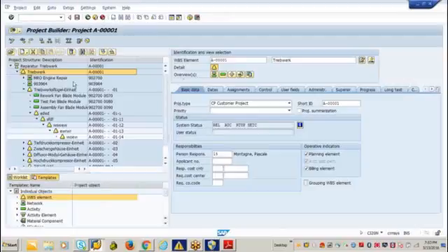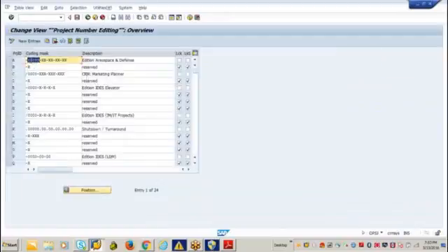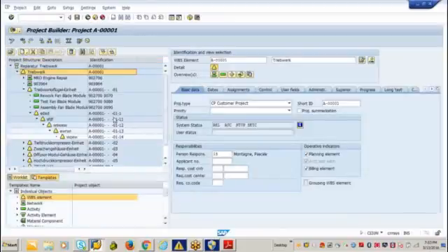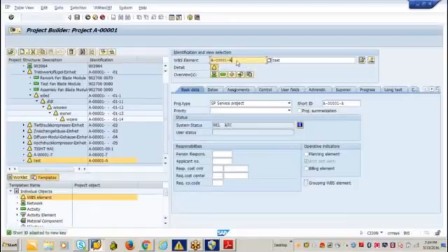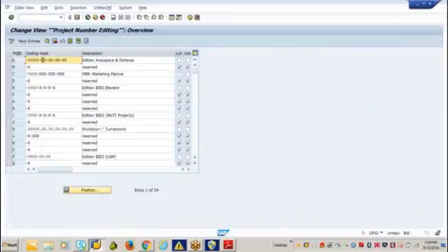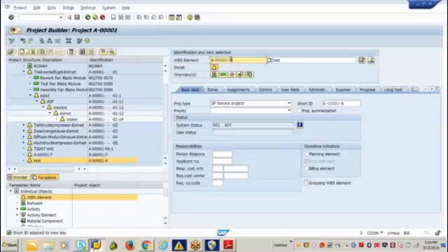Okay. So it is A, right? So A, it is 5 zeros and then XX. So meaning to say that here I can mention an alphabet as well if required. So say here, instead of 1 I will keep A. So system has taken it. Why? Because I kept X here. If it is 0, then the system won't allow you to change the number to an alphabet.